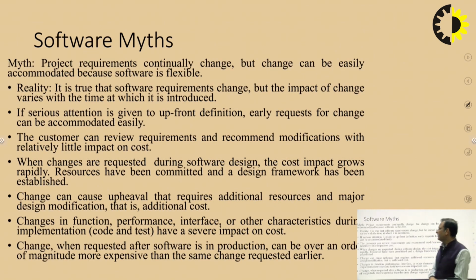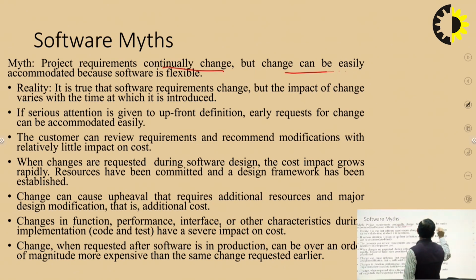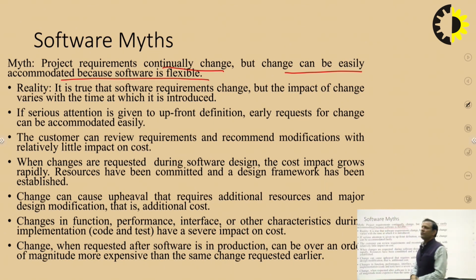Another myth: project requirements continually change, but change can be easily accommodated because software is flexible. Yes, it is true that software requirements change, but the impact of change varies with the time at which it is introduced. If serious attention is given to upfront definition, the early request for change can be accommodated easily.